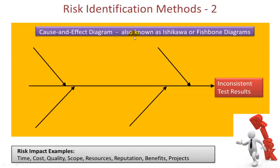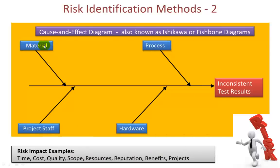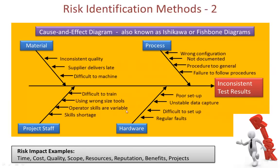Another technique is the cause and effect diagram, also known as Ishikawa or fishbone diagrams. The idea is that you take the area of uncertainty — in this case inconsistent test results, though it could be any other impact — and come up with key areas to consider: material, processes, project staff and hardware, as an example. You then brainstorm the areas which could result in uncovering risks that could lead to inconsistent test results. This is helpful because you can deal with each area in turn and decide how you might mitigate such problems.